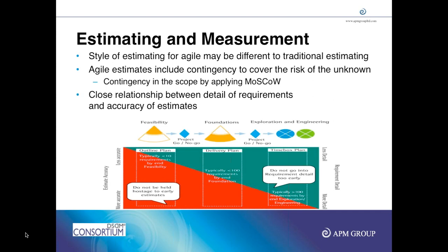When you complete foundations, at that time you know more about the system. So those high level 8 to 10 requirements are now broken down into detailed requirements, not very detailed, but you break them down into sub requirements. So 10 requirements now become about 80 to 90 requirements. Like I said, search is broken down into what kind of search results you are looking for, and the requirements related to search. So you have 80 to 90 requirements at the end of foundations.